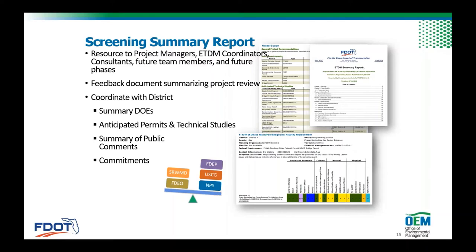And at the end of that, after they're reviewing things on our timeline, we also have a timeline to send out a summary report within 60 days of the end of that screening, with the intent being, how do we summarize all these interactions? Because you can have many agencies reviewing the same project, even for the same issue, but doing it for a very different reason.